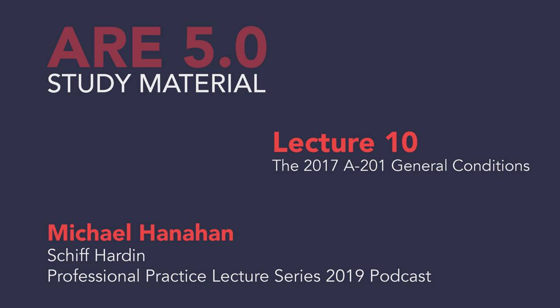When the owner and the contractor figure out their problem and the project starts up again, that subcontractor, Bob's Plumbing, has been sitting around for weeks while the owner and the contractor figure out their issues, or maybe months, or maybe years. If there are costs to Bob's Plumbing for sitting around waiting, this provision, 5.4.2, says Bob's Plumbing gets an adjustment in their contract for their delay. It's not Bob's Plumbing's fault that there was a fight between the owner and the contractor. And Bob's Plumbing is going to say, if you want me to keep working for you, I've incurred costs waiting around. You've got to pick that up. And that's fair.